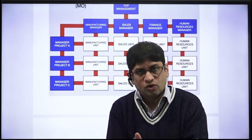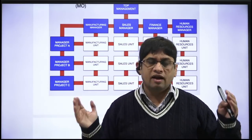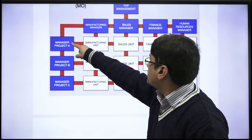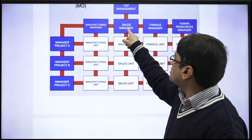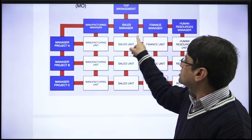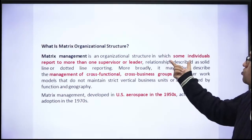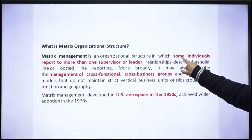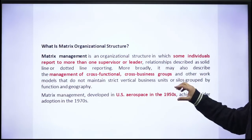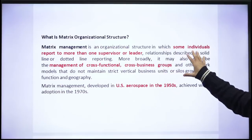In a matrix organization structure, an employee reports to more than one manager. There is a project manager handling the project, and the employee reports to the project manager as well as the functional manager — for example, the manufacturing manager. The project manager takes ten people for the project. If project A requires an employee from the sales department, the project manager will ask the sales manager to send that employee, so the employee reports to both the sales manager and the project manager.